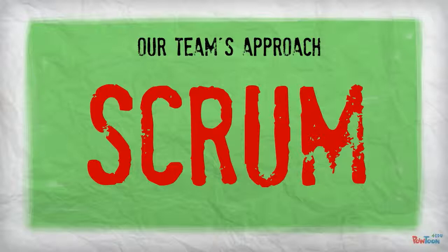This directly contrasts with the steps of the waterfall method within the SDLC process. The planning process is front-loaded within the waterfall method, which sounds great in theory, but in actuality it is here that the least amount of knowledge required for the project is known. In fact, you know less about your project than you will ever know in the future. This is why we believe that the Scrum method is the better approach.